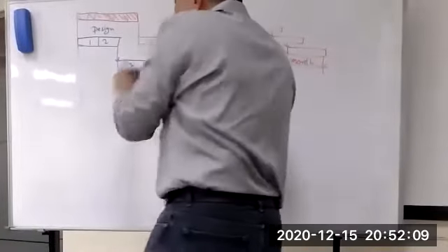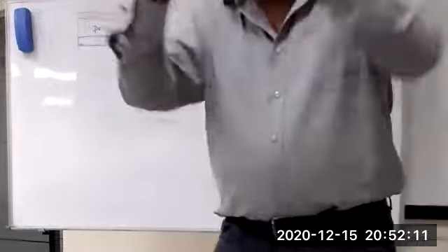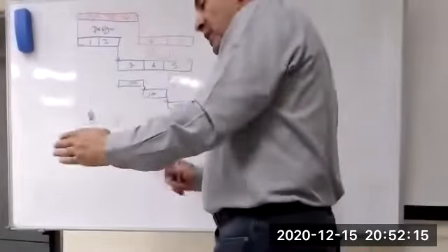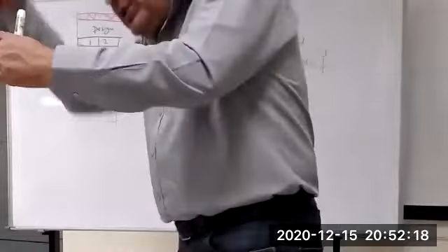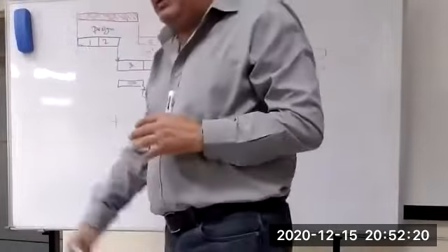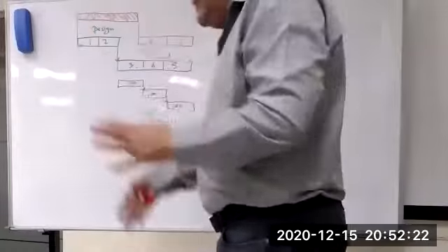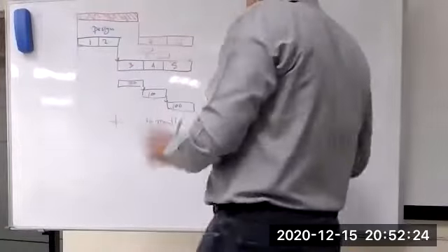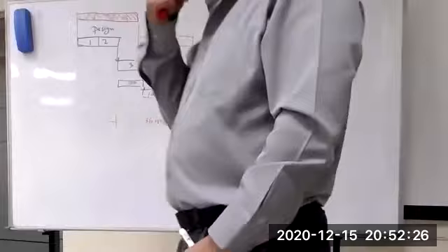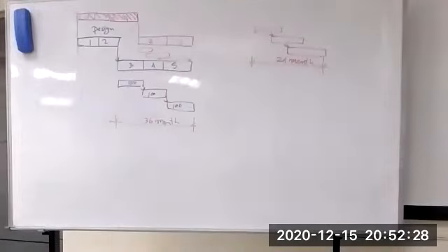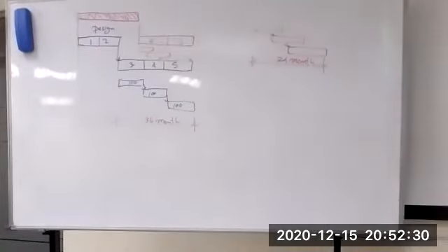What do I do? Overlapping the 100 villas, 100 villas. So now it is parallel, meaning the first 100 villas, and in the middle of it, I will start the second 100. Second batch, then the third batch. What are the consequences? I will give you another story.